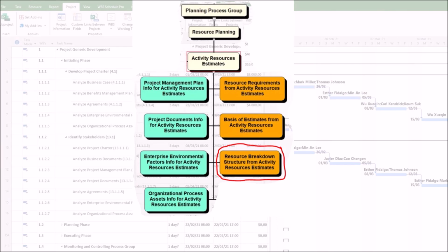the project lifecycle. In contrast, a poor resource breakdown structure doesn't just result in a bad document. It cripples the core objective of the estimate activity resources process, which is to create a reliable and actionable plan for the people, equipment, and materials needed to succeed. The resulting inaccuracies ripple outward, causing budget overruns, schedule delays, procurement chaos, and ultimately, project failure.